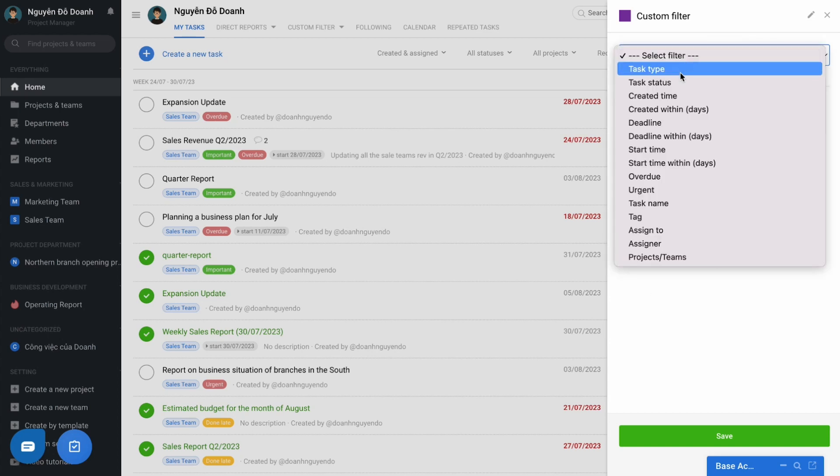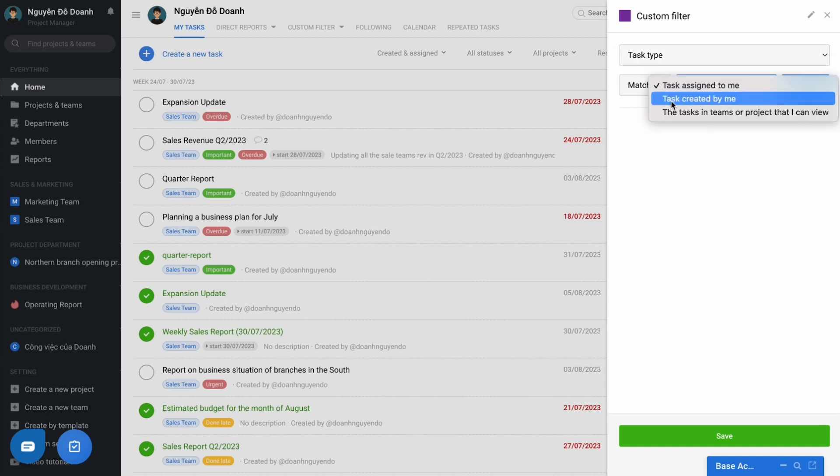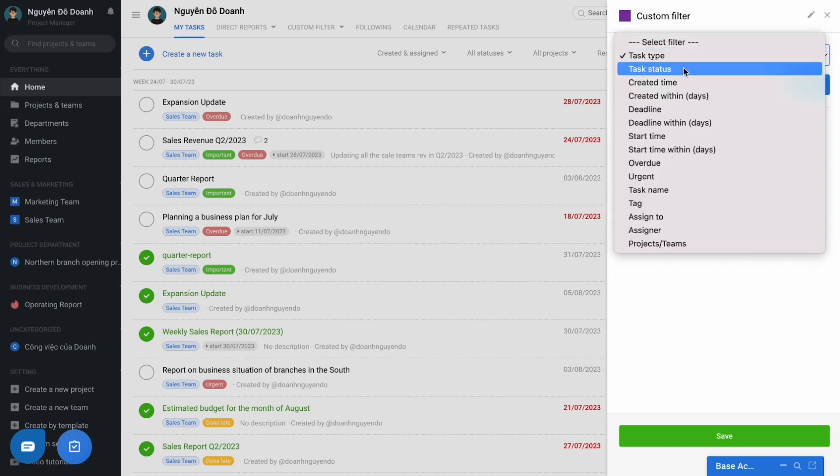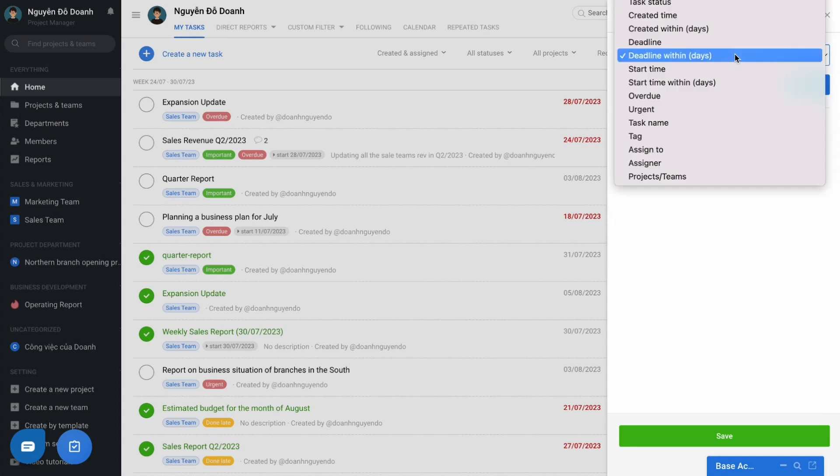For example, if you want to filter out all the tasks that you have assigned to others and have a deadline for the past 7 days or the next 7 days, it will be the filter to satisfy 2 conditions.